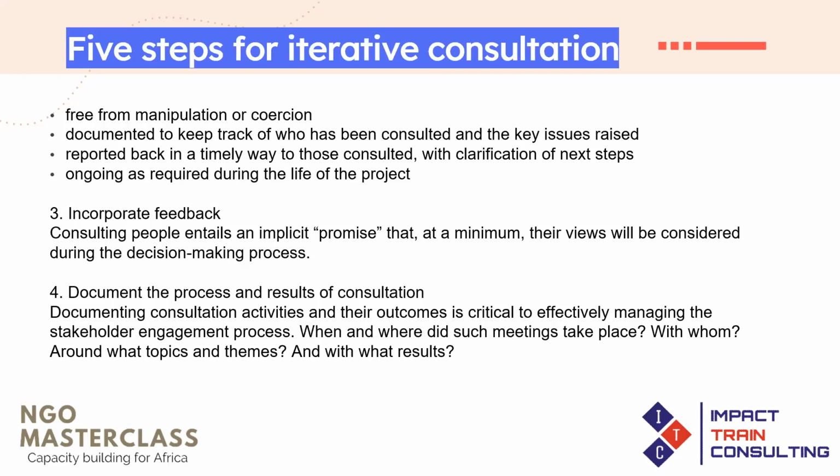And the fourth step in consulting is you need to document the process and results of consultation. So it's very important that you keep a log of stakeholder consultation. You need to look at having a log, a register, whereby you are documenting when stakeholder consultations are taking place, who are the people who you consulted with, what are the topics that you discussed, what are the decisions that were reached as a result of the consultations, what are the action plans that you have.